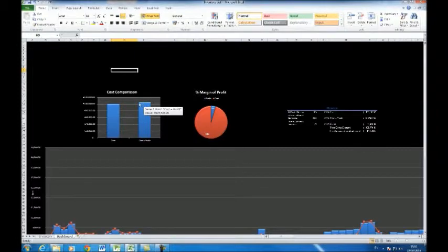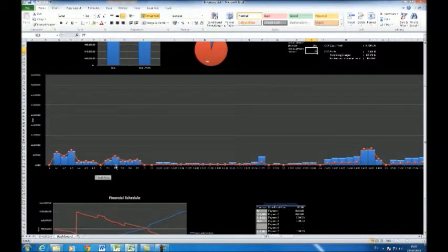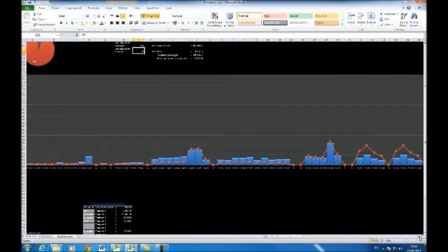The margin of profit is displayed graphically, and in the finance section the user can input the percent profit desired, the rate adjustment increase and the rate adjustment decrease. These two options will have an effect on the price being charged in the inventory. The cost analysis graph displays the comparison between the cost of each activity in blue and the price being charged. In cases where undercharging occurs, these are activities which are unavoidable, whereas the activities which are overcharged are opportunities to charge a premium for extras.